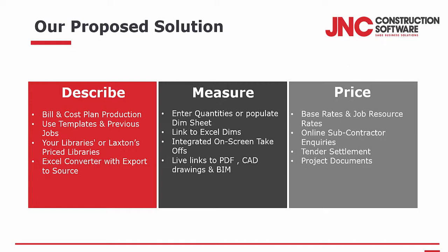Measuring is about doing on-screen takeoffs. Those takeoffs have a live link to item lines in your bill of quantities. We can do the takeoffs from PDF, DWGs, BIM models and many other file types.